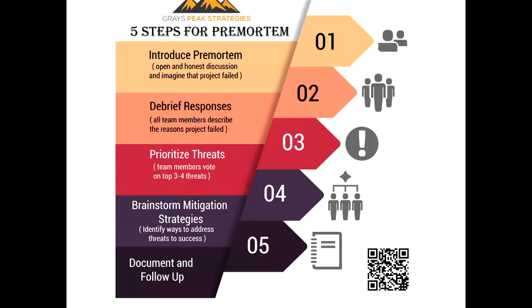Think about having a pre-mortem at the beginning. If you're finding it hard, I spoke to the Scottish guy and he said it's a really good idea to think about all the worst things that can happen. Oh, so I just borrowed this slide. But the idea is right at the beginning, if you use a generic risk register, everyone will just tend to ignore it and say, yeah, the risk register, we have to do that, but they'll ignore it. If you make them build it by thinking about everything that will go wrong, and you do that together with them, the possibility is that you've got a shared risk register that you work through together.